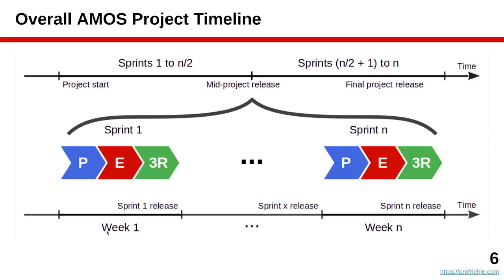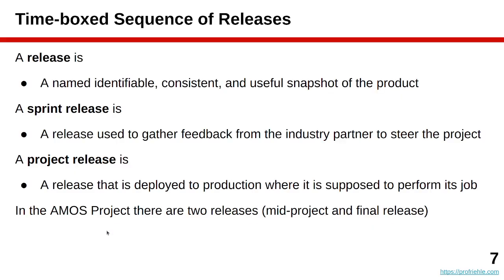In addition to having a sequence of sprints — 14 in total in AMOS — you will also have two more important points in time: the mid-project release and the final project release. Scrum in AMOS is structured not only as time boxes but time boxes with results, so there needs to be a deliverable at the end of each time box. This value increment, as Scrum calls it, is in our case usually a software release — a named, identifiable, consistent, and hopefully useful snapshot of the software.